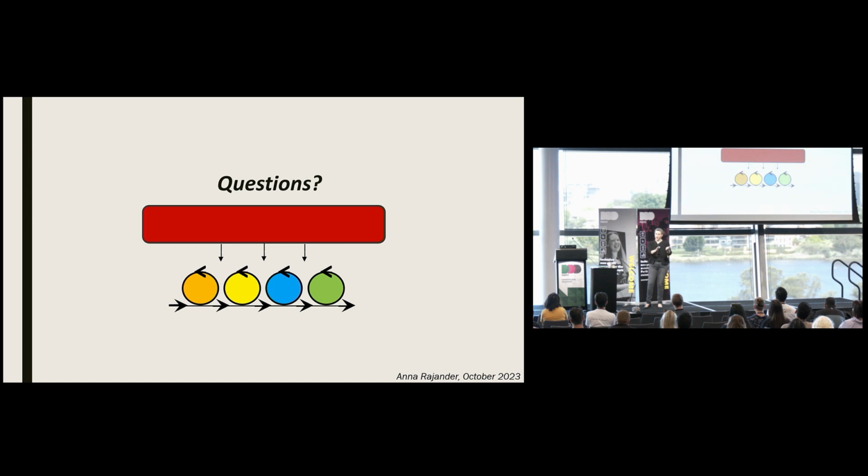So if the Agile team's quite happy working on their product enhancements, don't just start throwing a whole bunch of stuff on the backlog that's going to get stuck in quagmire because it's dependent on a whole bunch of stuff. Manage it a bit better. Think about when you start introducing that work into the backlog so that they do still maintain that control and do as much as possible. So you might not tell them that you're managing this waterfall process over here before you start planting stuff on their back, but you know that's essentially what you're doing.